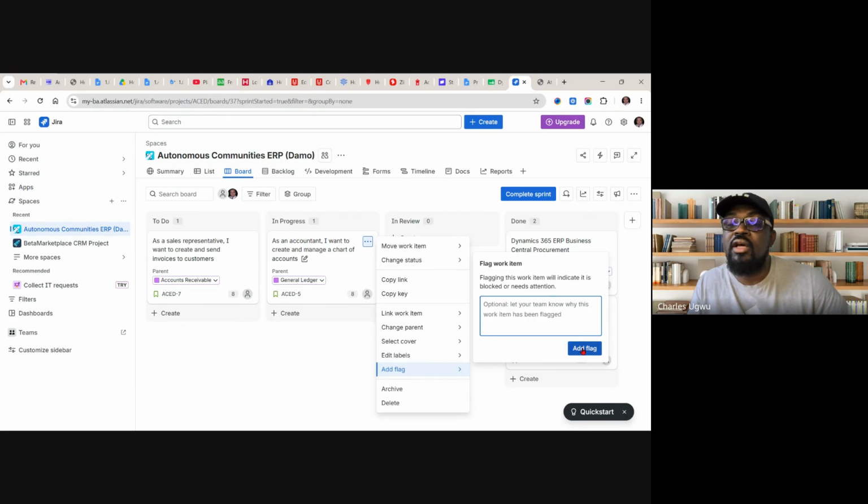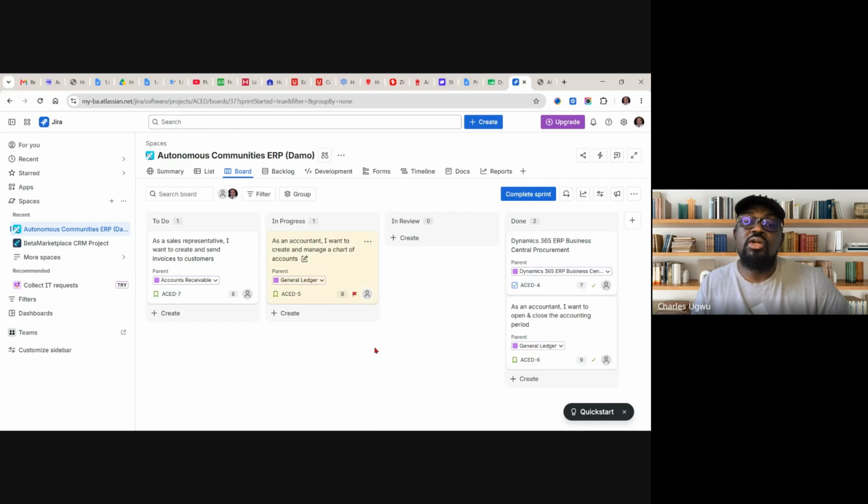Just add a flag. Once you raise a flag, you put this work on hold. Once the Scrum Master sees a red flag in this environment, the Scrum Master will know that somebody is down, and will come and meet you.